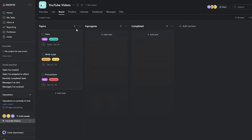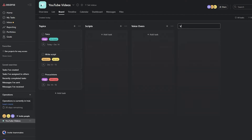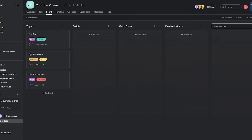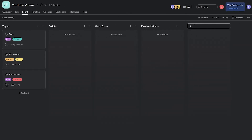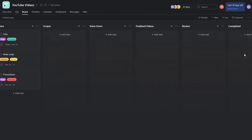My actual board looks a bit different. I have columns for Topics, Scripts, Voiceovers, Finalized Videos, Review, and Completed. That's basically how the full board is laid out.